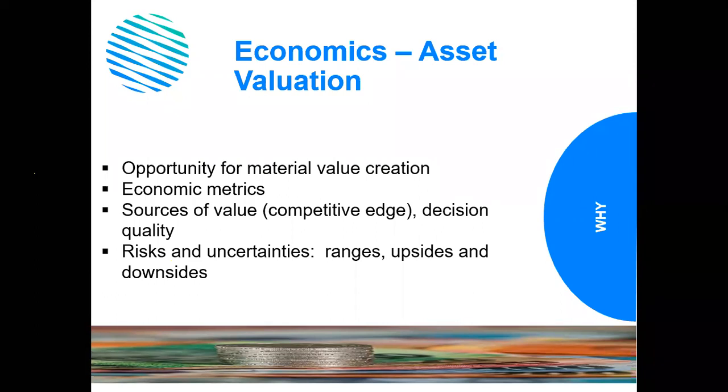There'll be a lot of uncertainties on both the income and expenditure sides, so your model is never going to be a precision exercise. In fact, budgeting to 10 decimal places is always dangerous. But more importantly, you need to make sure that all the significant CapEx and OpEx cost elements are included and nothing's been left out, or certainly nothing major has been left out. For example, you'll need to make sure you fully understand the tax and royalty regime and model all the tax outflows accordingly. You'll also need to understand your decommissioning obligations and build in the costs that arise from them. Leaving those out could leave you with a very nasty surprise at the end.